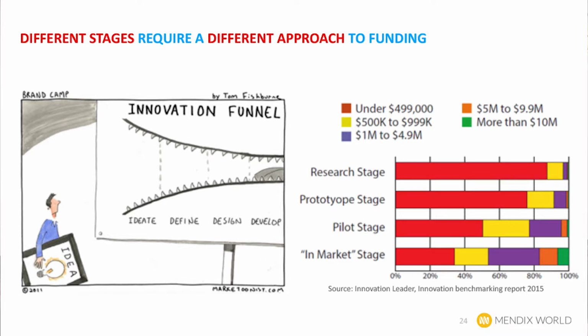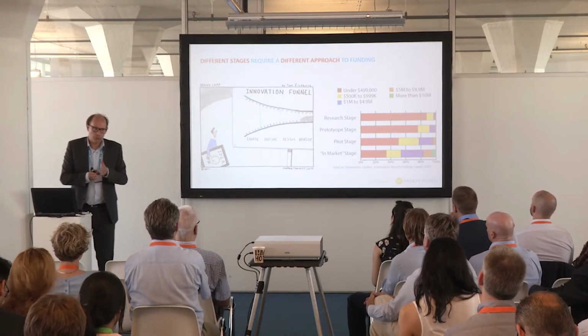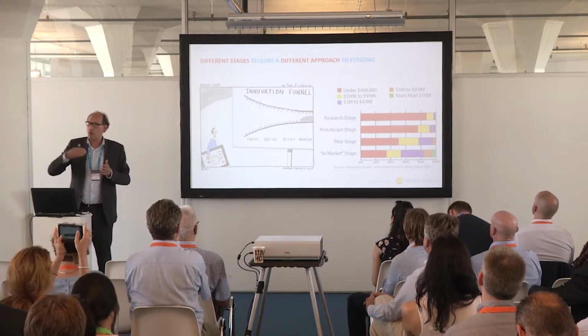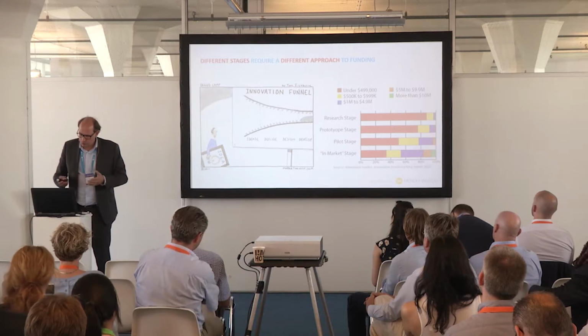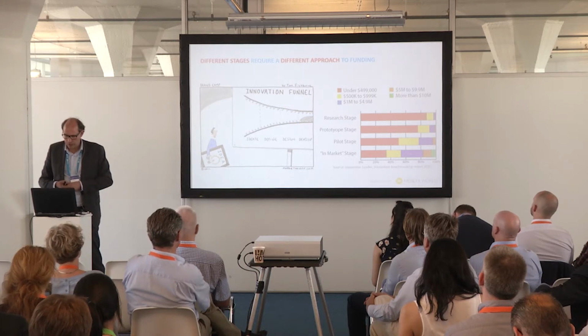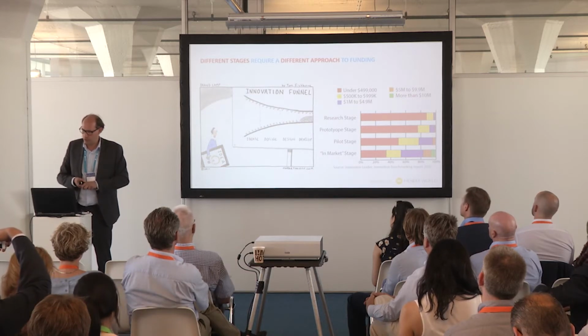And what you see is that one of the key things that you need to think about is how can we set up an ideation funnel that makes sense, or an innovation funnel, where we have a research stage, a prototype stage, and a pilot stage. And in every single phase, you would have different buckets of money associated to those phases that will allow you to deal with different prototyping or ideation or actual development of apps. For instance, in the pilot phase, you would focus on identifying the target audience. In the prototyping phase, you would be looking at understanding and identifying the feasibility of a specific idea.